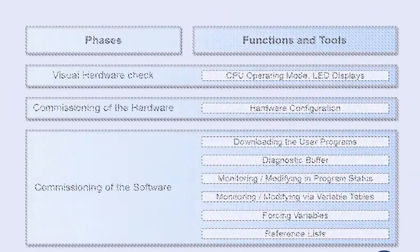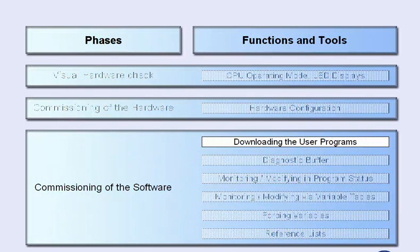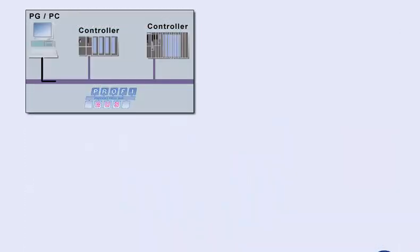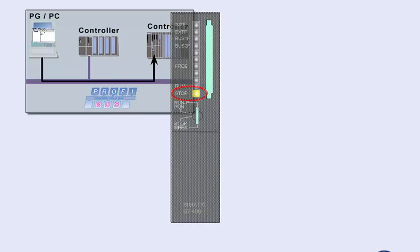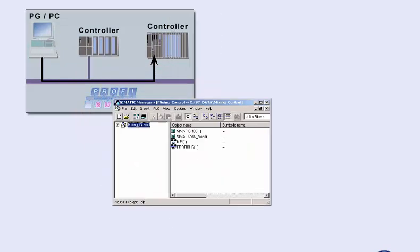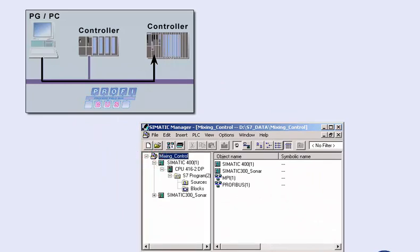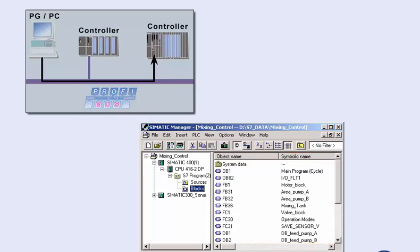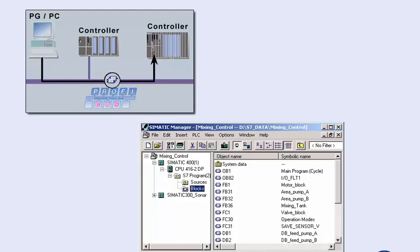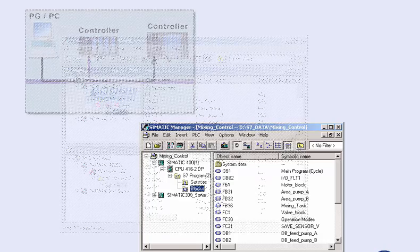The next step is software commissioning, which starts with loading the user program into the controller. This requires the programming device to be online and the CPU to be in stop mode. We open the offline project, which is located on the hard disk of the programming device, and select the station as well as the block container. The block container contains all runnable blocks of the user program. Pressing the download to target system button, we now transmit all blocks into the user memory of the CPU.